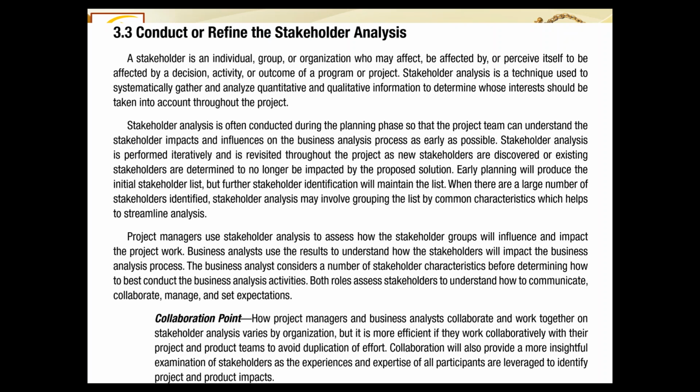Now this is very interesting. This is the point where stakeholder management and risk management have many things in common. As you identify the risks, then do the qualitative analysis, then do the quantitative analysis, and then develop the responses, exactly in the same way, you first identify the stakeholder, then you do the qualitative and quantitative analysis. Though it is not separately called qualitative and quantitative analysis, we just call it stakeholder analysis. But stakeholder analysis includes the quantitative and qualitative analysis, and only then can we have the result of the analysis, how we are to deal with each kind of stakeholder.